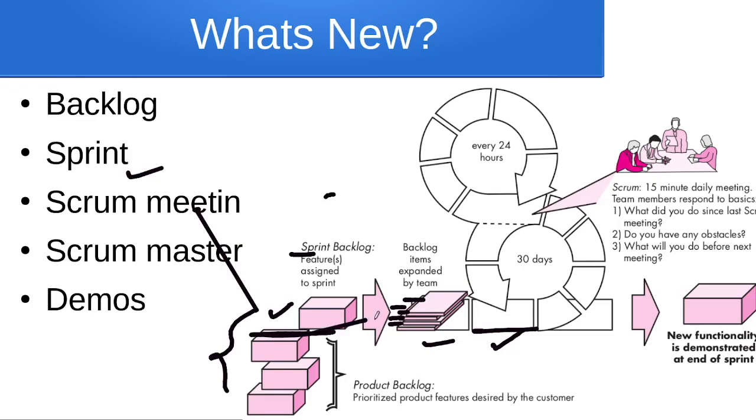Having known these things, if at all we want to make certain changes, it is possible. Meaning changes in a sprint is not possible. Once a sprint goes, then done. We are not going to change the sprint. However, after this is completed, some backlogs may remain, or whatever the backlogs are, they can be adjusted.